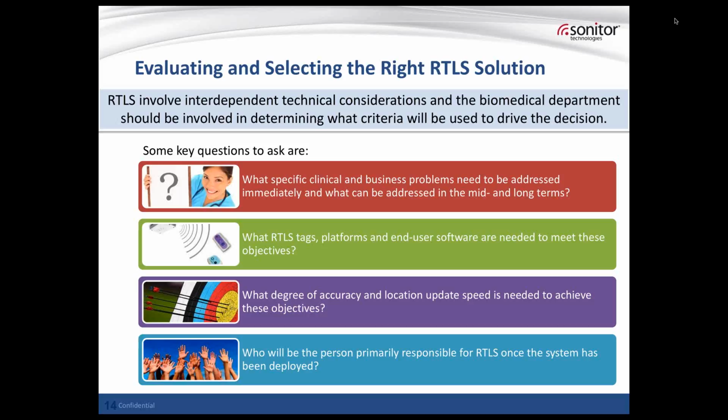This is perhaps one of the biggest flaws of most of the RFPs that I see. The vast majority request pricing for several use cases from one vendor when they would be much better off issuing RFPs for individual use cases. That wouldn't prevent the same software vendor from submitting for multiple use cases, but at least then you get a better comparison between the different ones and strengths and weaknesses.